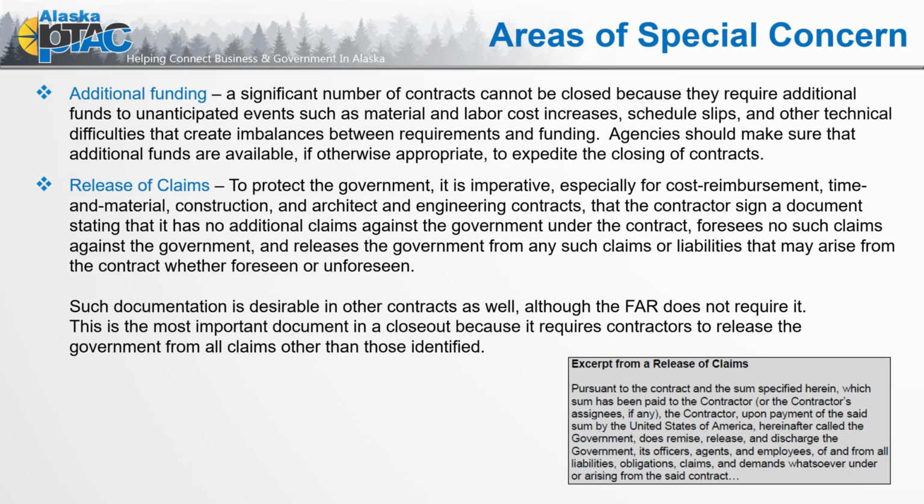So the additional funding, again, when we have those changes in the contract, such as now suddenly having all of the PPE requirements, health and safety, all the additional things that were unexpected, those contract changes had additional costs that were recognized by the government, but does the agency, that program staff, have those additional funds? That can actually tie up the contract closeout process while the agency goes and looks for the funds.